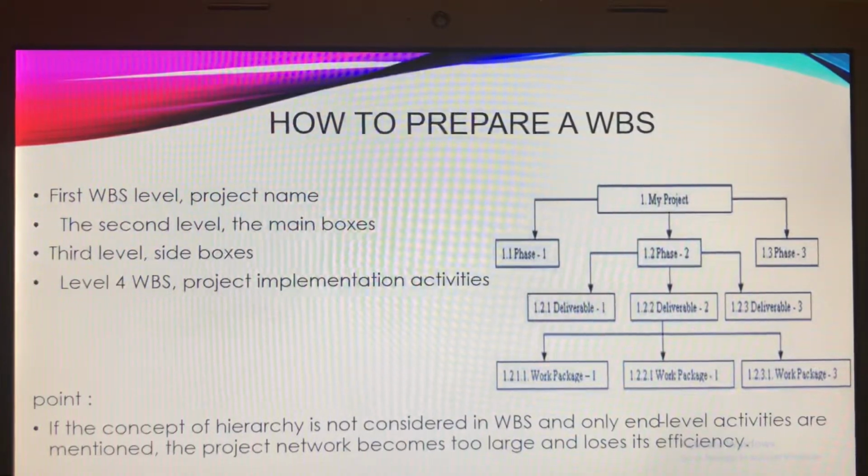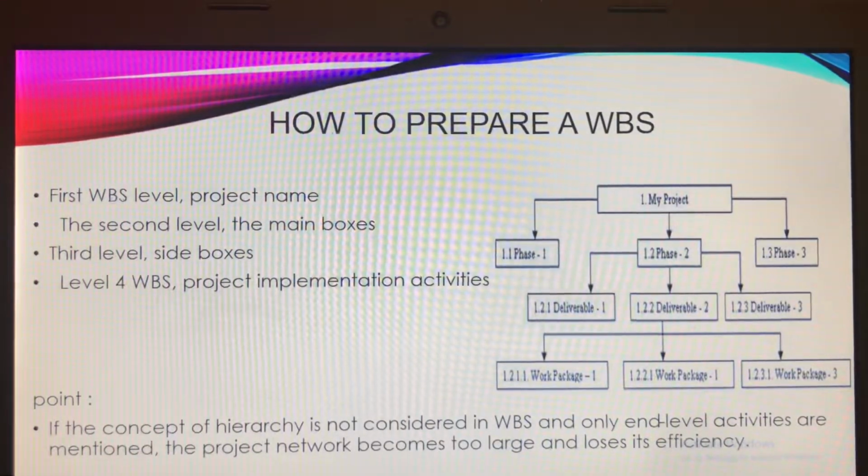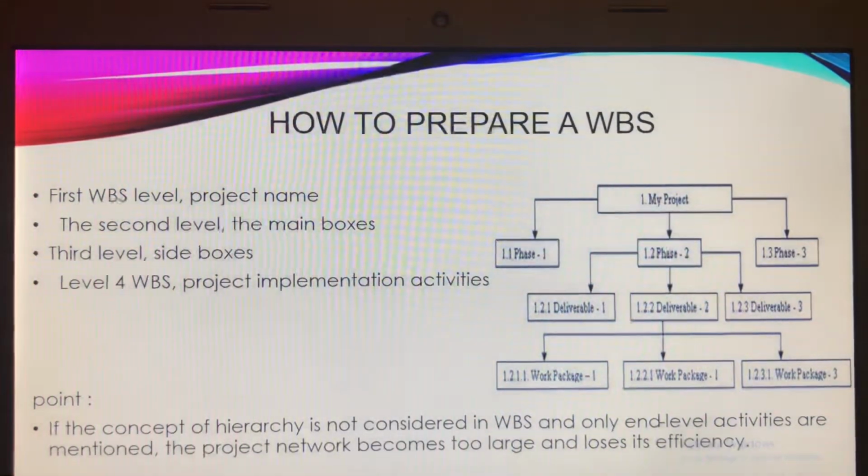If the concept of hierarchy in WBS is not considered and only end-level activities are mentioned, the project network becomes too large and loses its efficiency.